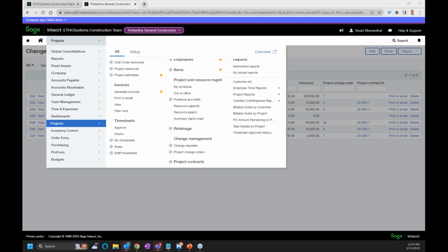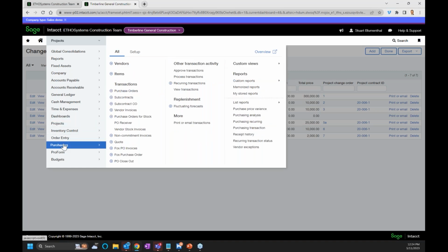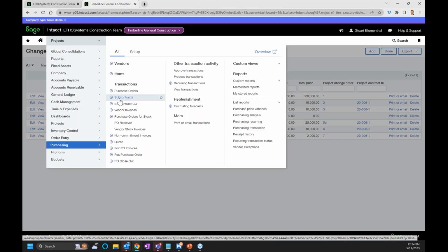So with all that, what would happen is that we've got a request in there. As I said, we could create a purchase order or subcontract against that line. It goes against that estimate. We can start looking at our estimate versus our estimated cost versus our actual cost. That should update your committed cost report and all the different things throughout the system.